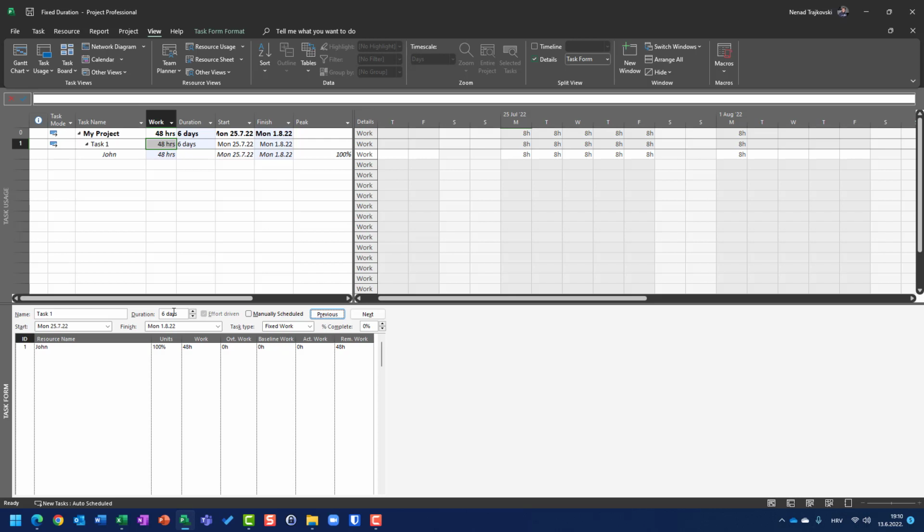So instead of John finishing his work in 4 days, and Mary as well, since John should work another 16 hours because Mary is gone, those 16 hours will be, let's say, effort for John.